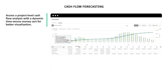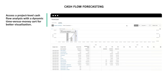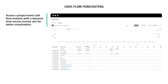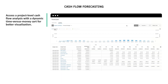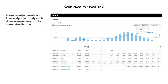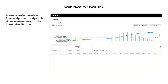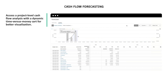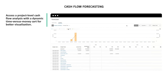Cash flow forecasting: one of the last features here is the ability to spread your project's revenue and costs over the entirety of the job. The visual representation our product team has put in place really helps you understand what your costs are going to look like over the life cycle of your job. There are a couple different ways to view these charts — by percentage, by period, or as a cumulative effect. The intent is to make sure your project team understands what cash flows look like on the job.